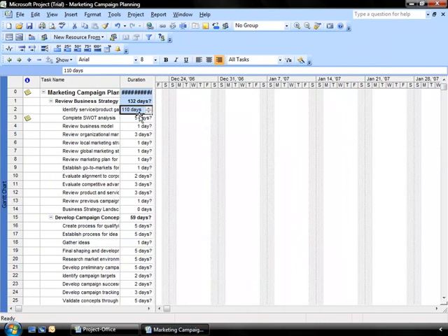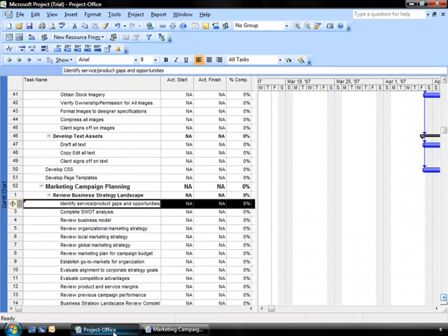So you can see here that you've got the beginnings of some collaboration, and you can include information from different projects within the master project. So you could break down some of your workload into sub-projects, have them managed by other project managers, and you track it in the overall project in your master project plan.